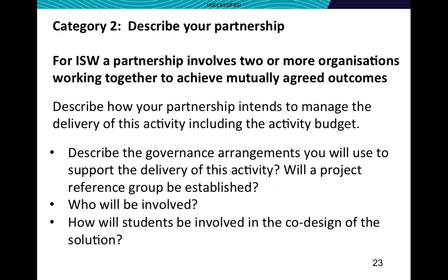You're going to want to provide evidence. One of the things that we do ask you to provide, of course, is a partnership agreement. We really need to understand clearly where is the line between the partners involved in the activity in terms of roles and responsibilities. What happens if something goes wrong, or if you need to perhaps make a media statement? Who's going to do that? Be sure to also cover the commitment and the contribution from each partner, and make sure these elements are included in detail in the partnership agreement.